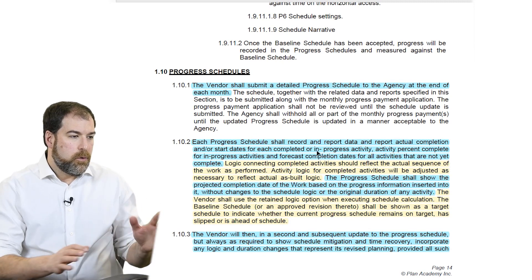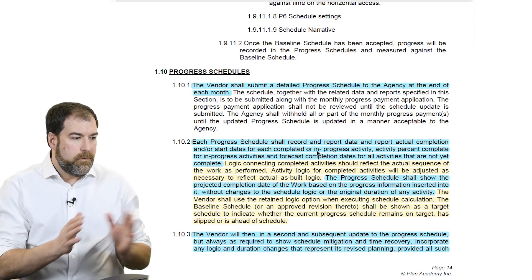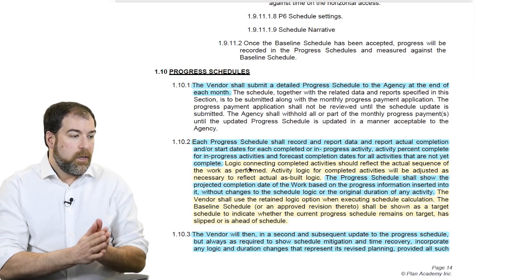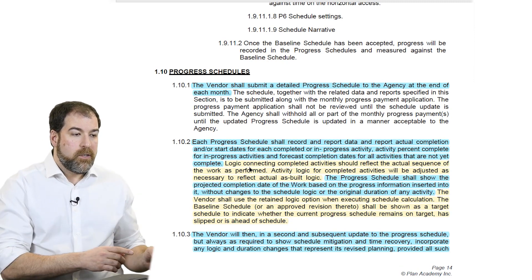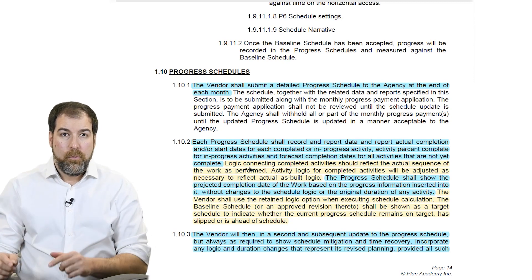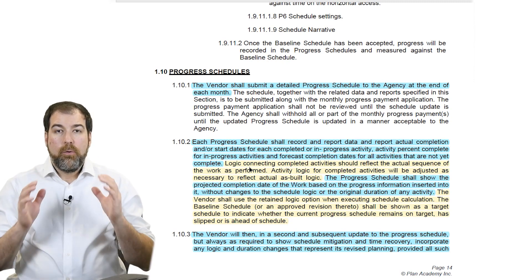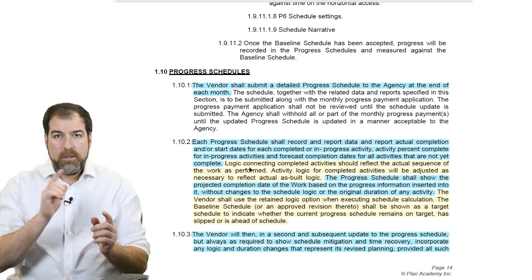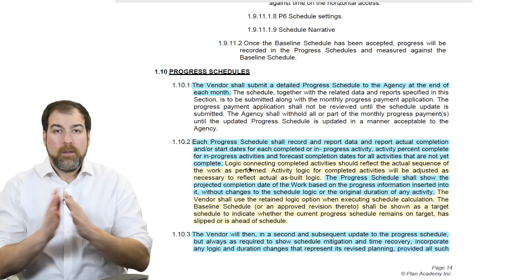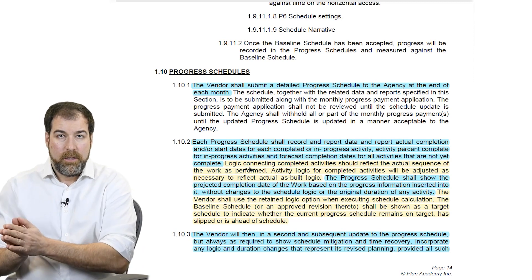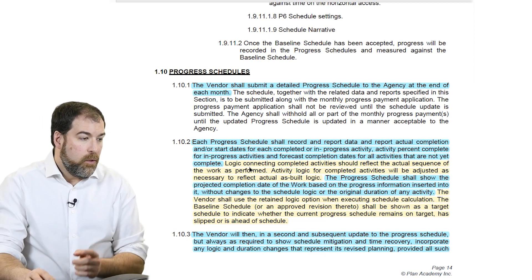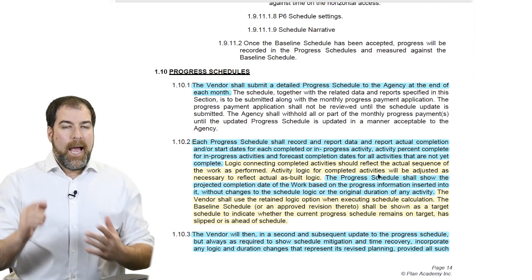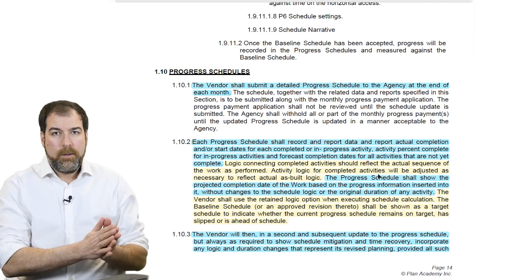Each progress schedule shall record and report actual completion, start and finish dates, etc. But here's what it also says, highlighted in yellow: logic connecting completed activities should reflect the actual sequence of work as performed. That means your actualized schedule should represent exactly the sequence that you executed in the field — regardless of how you planned it, it needs to look like how you did it in the field. Any logic for completed activities will be adjusted as necessary to reflect actual as-built logic. They really care about this — it's really important.